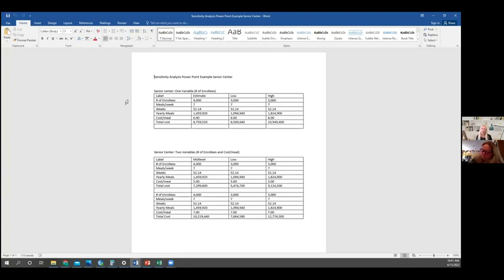So to do a true sensitivity analysis, the first estimate should be based on the values that are judged to be correct. So what you think, based on your budget or your plan or your program, then you're going to want to make 2 more estimates, okay? These are supposed to be 2 extreme but realistic estimates that reflect possible scenarios.